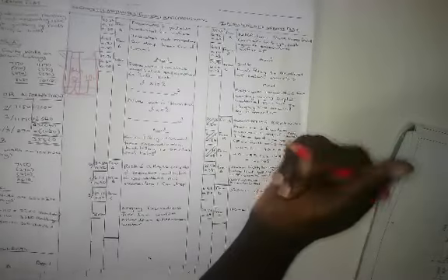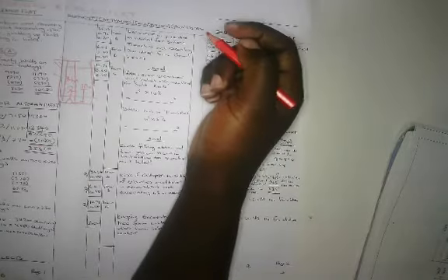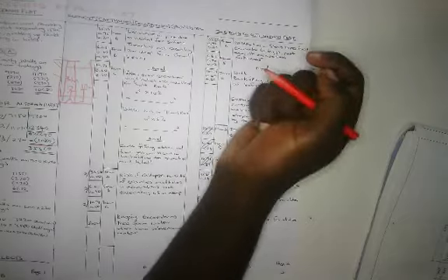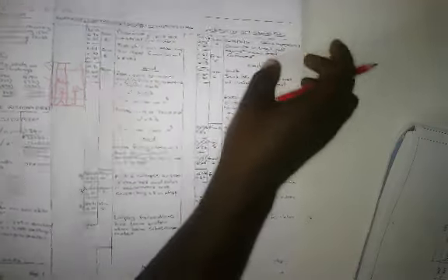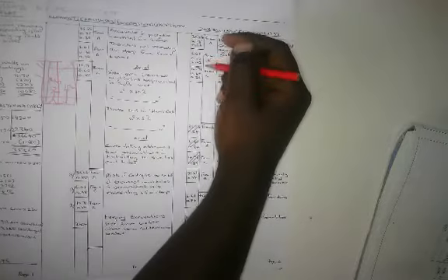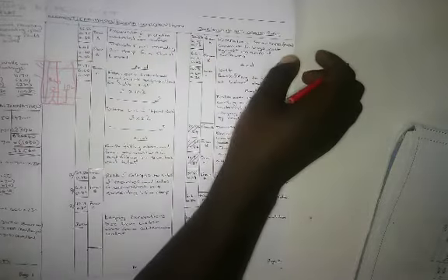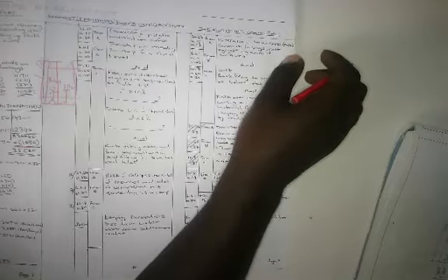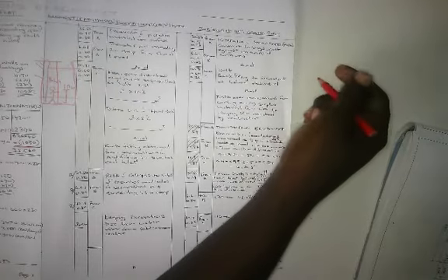Okay, now let's show you how easy it is. Now we don't have to go refer back to the drawing. Okay, because we already have our collects. Okay, and in our collects we already stated the size of our footing. It's 750 by 230 for your 270, and then it's 700 by 230 for your 230, and then it's 600 by 230 on your 110 wall. Okay, so what do we do? First item, we need to do excavations.